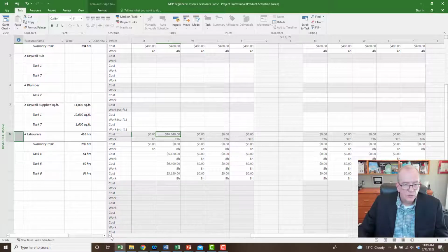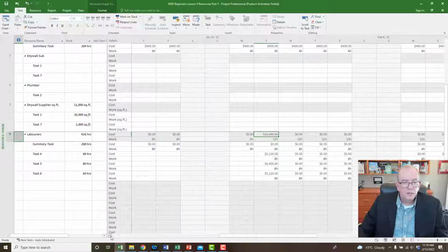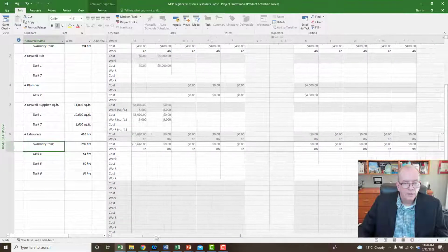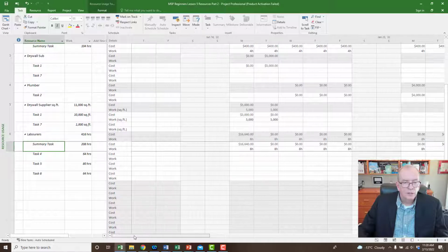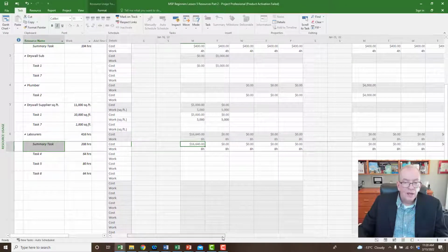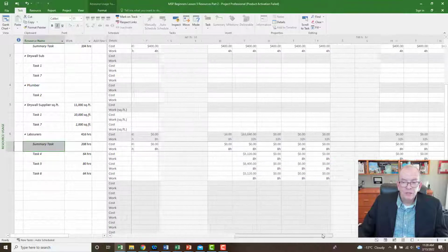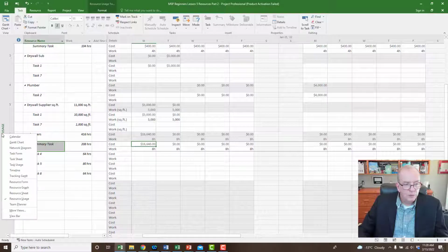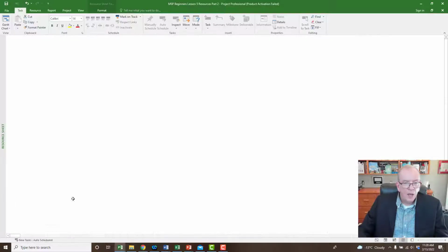Well, actually, that's earlier than I'm saying there. So let's go on the summary task and just go back to the beginning. I forget where I started this project. There it is. All right. So there's nothing before here. You notice on the first day, it's got 16,400, and then I'm not paying anything for the rest of the project because I paid them all on the first day. That's got to do with the resource sheet and how I put the money.